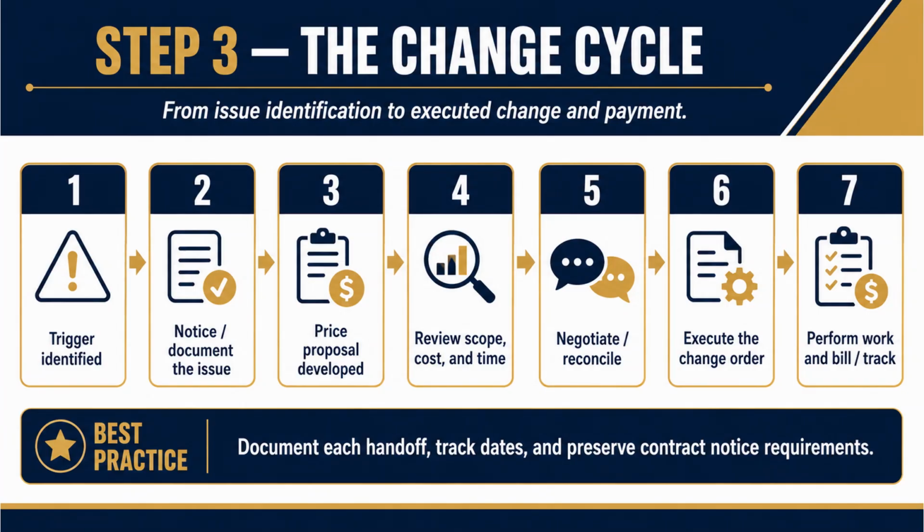4. Review scope, cost, and time. The owner and design team examine your proposal. 5. Negotiate and reconcile. There's usually back and forth here, and that's healthy. They may question your quantities, your rates, your days. This is normal business, not a fight. You defend your number with your documentation.